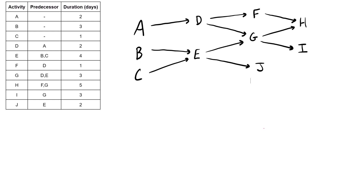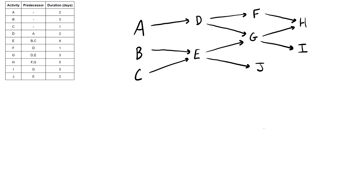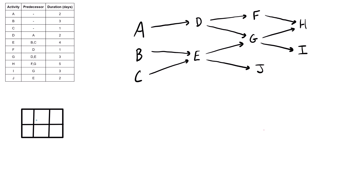Before we draw our good copy, let's resize and drop in our template. The convention we'll use: the activity name goes in the top middle, duration in the bottom middle, early start in the top left, early finish in the top right, late start in the bottom left, and late finish in the bottom right.